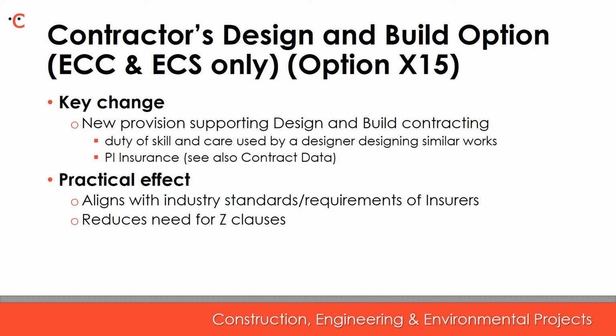Thirdly, it also deals with issues relating to the retention of documents in relation to design information. Again, this is a preference of insurers who frequently required contracts to define retention of documents. As this now aligns with industry standards, parties may see less need for Z clauses.